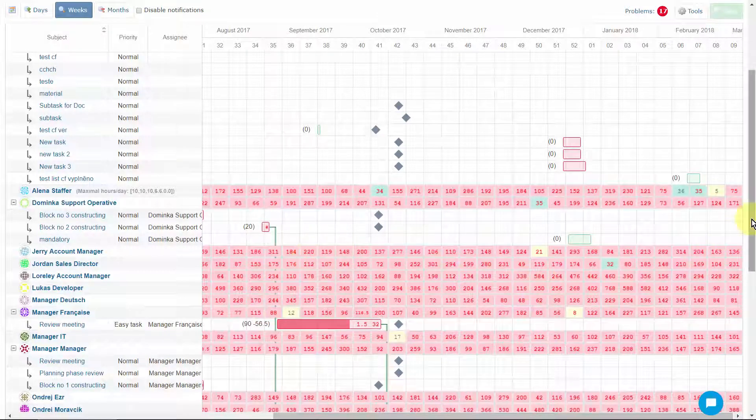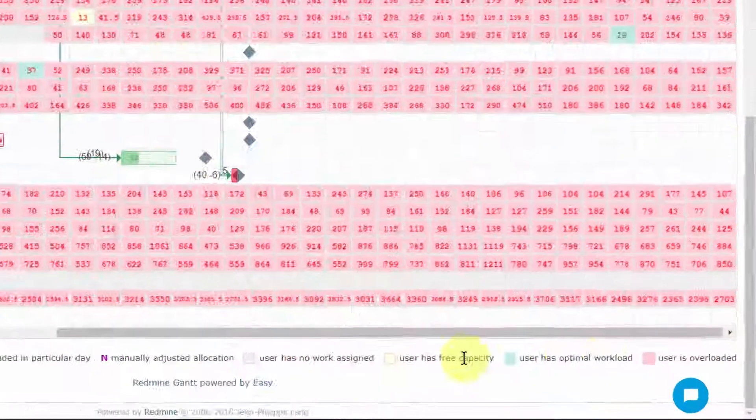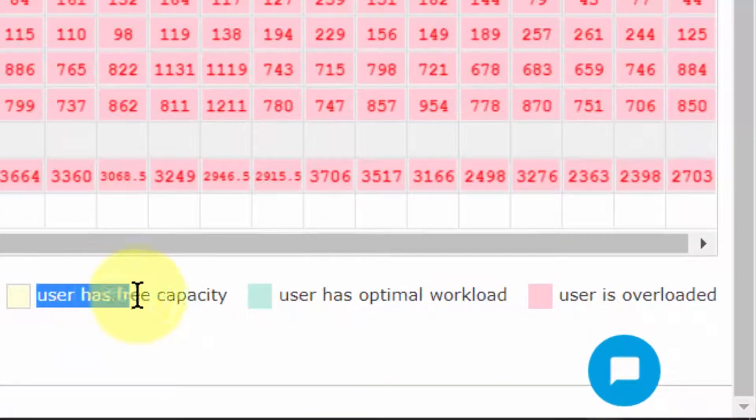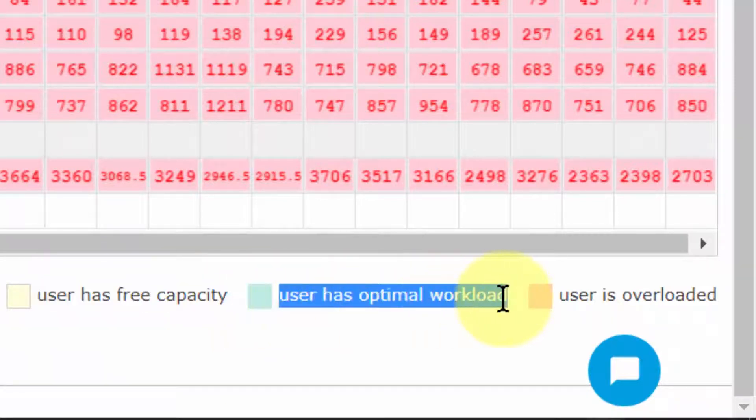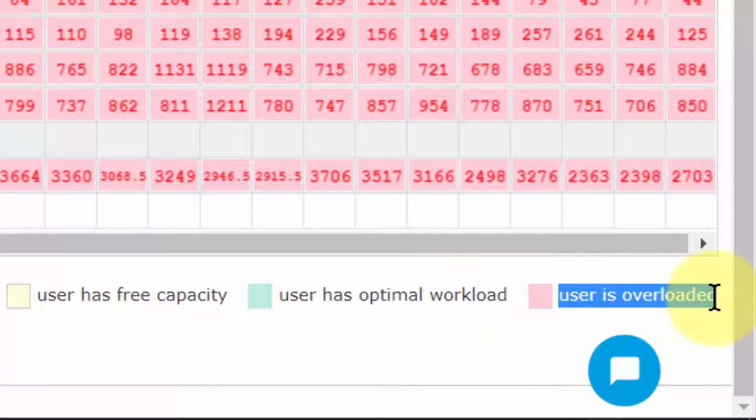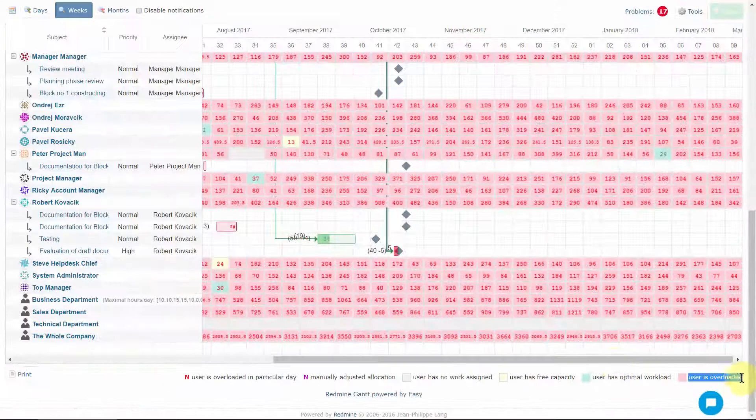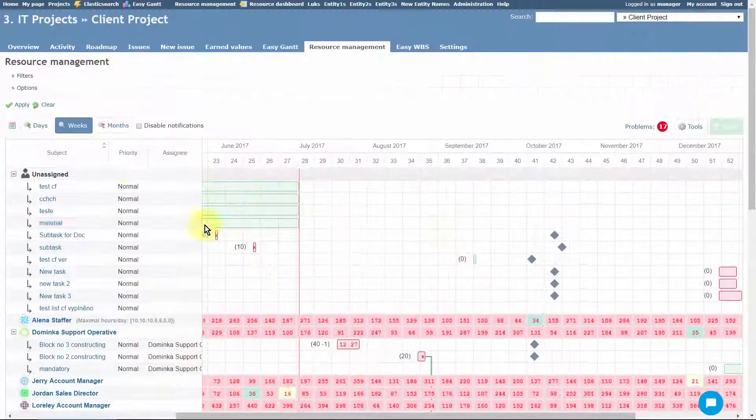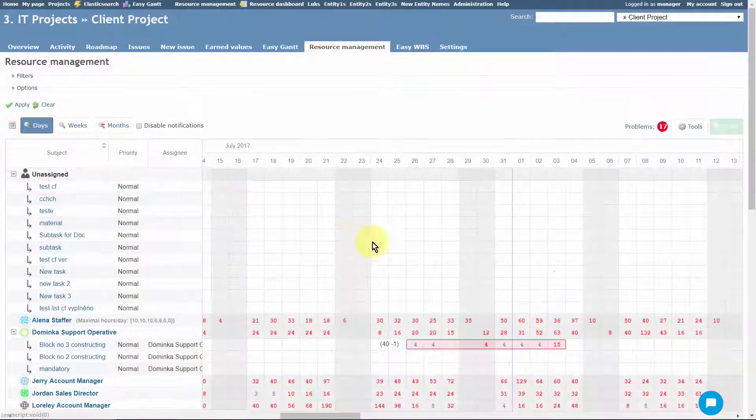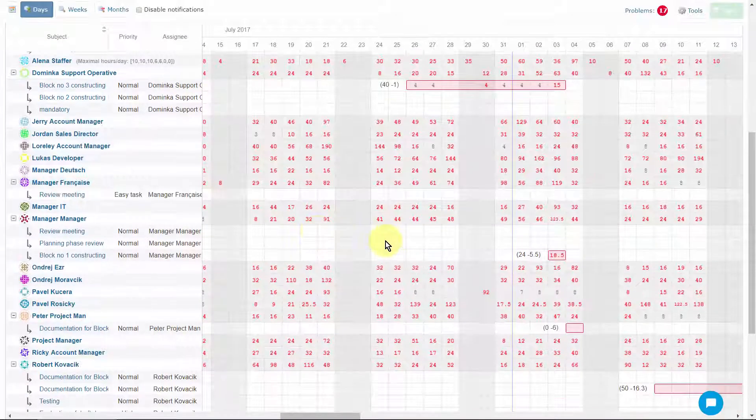Meaning, when it's yellow, there is still free capacity. Green color means optimal workload, and red means this user is overloaded in that week. If we go to a daily view, these red numbers indicate this user is overloaded on one particular day.